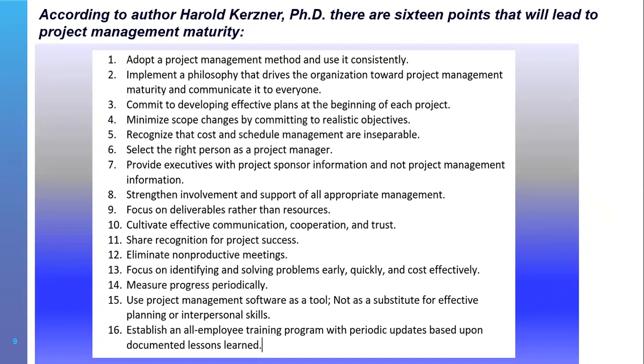So important is to select the right person as a project manager. And this is much more a focus on the customer side too. So I see it a lot that the IT admin is the project manager. He doesn't normally have any power to get people into a room when you need them. He doesn't have any power to really escalate if something goes wrong, or decision-making power. I prefer on the customer side to have a functional person being the project manager who is in a manager position and who can make things happen.